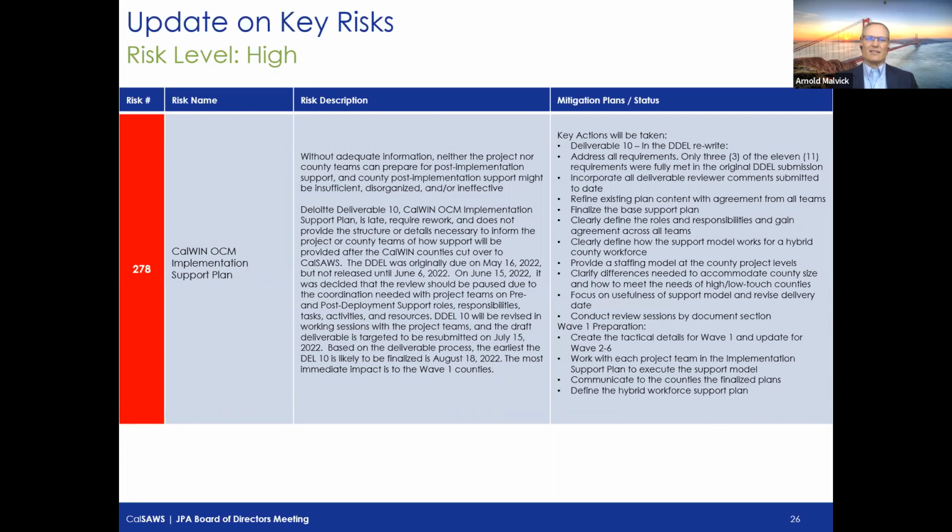We're looking at the database layer on both the CalSAWS as well as the Gainwell side to optimize that, so that we mitigate any risk that occurs over the conversion weekend, as well as the post-conversion Monday when we come back up, having the increased volumes that result from that conversion. So that's why we're performance testing the online side, and we're performance testing the batch side to mitigate the database impacts.